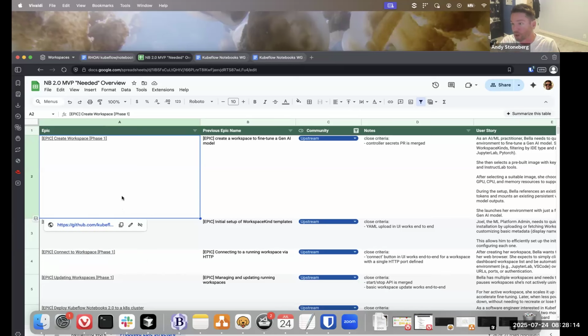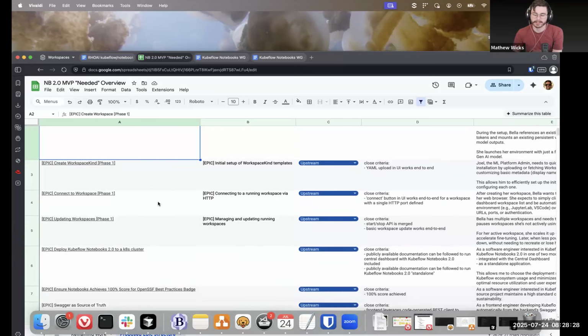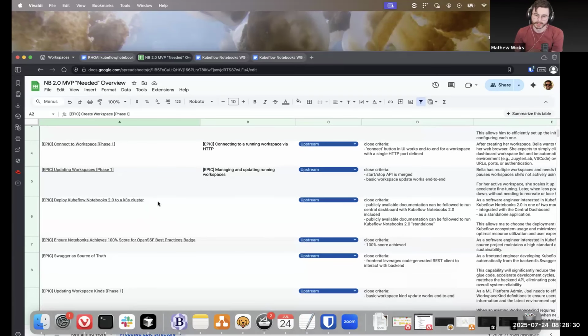And so the ordering of these epics, I spent a lot of time on that. If Epic 1 is not closed, reviews and merging of those PRs should come before Epic 2. This sequences the work. Right, that's fine. The only reason we were using epics before was that it forces us to talk about the reasons for things existing, and then group features under there, and then group work, which doesn't have specific work items, and then have work items under the features.